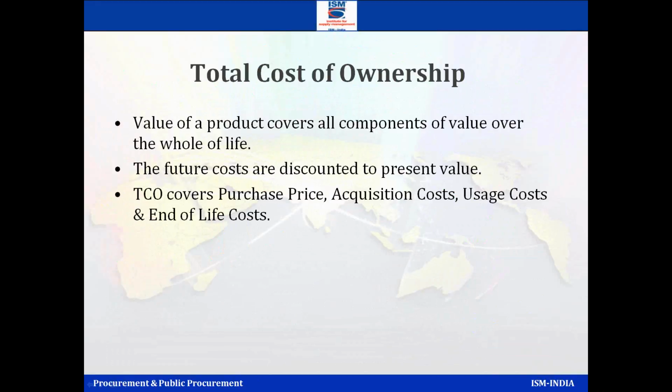So you have to compare both. We have a concept of TCO and a concept of life cycle costing. Life cycle costing we normally use for equipment with a lifetime, the capital equipments. For day-to-day procurement, we use the concept of TCO.